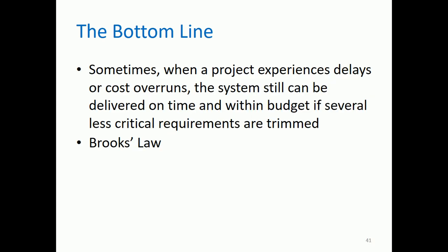Sometimes when a project experiences delays or cost overruns, the system still can be delivered on time and within budget if several less critical requirements are trimmed. So that is also a solution. If there is a delay in the project, you could remove the less critical requirements. So we have this so-called Brooks Law. Brooks Law states that adding manpower to a late project makes it later.